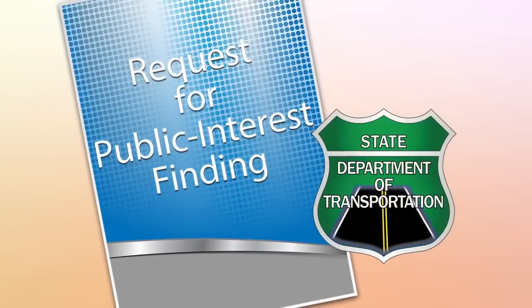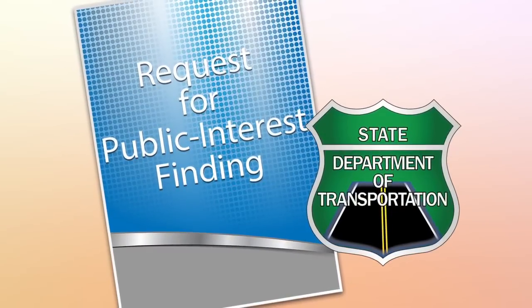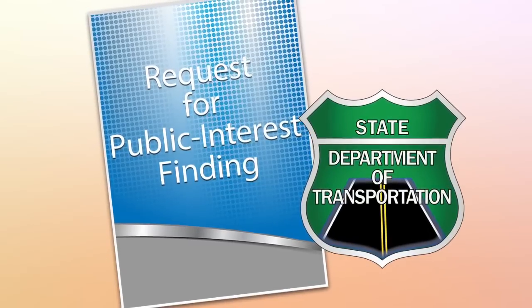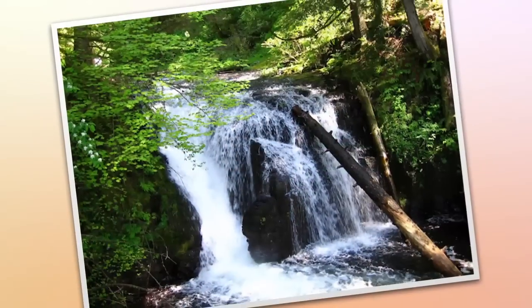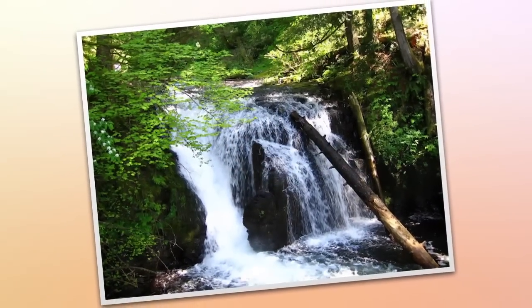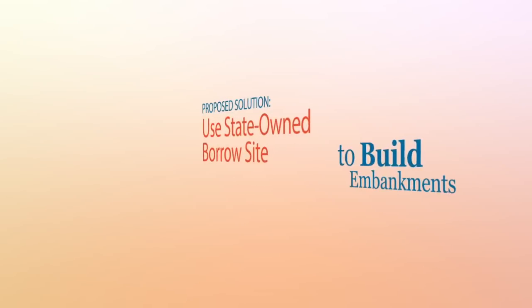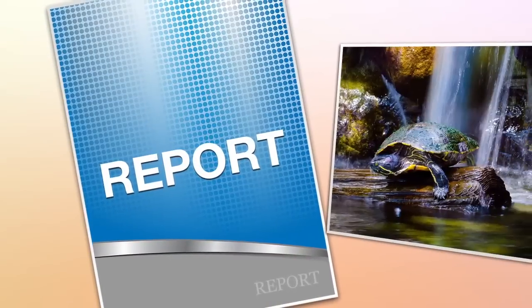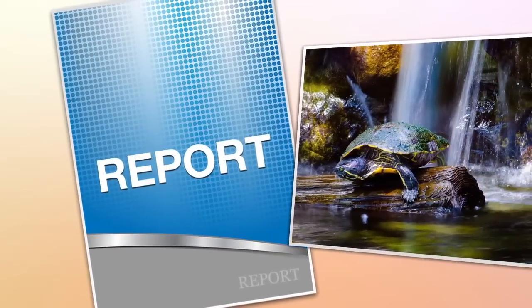To do so, the local public agency, or LPA, prepares a request for a public interest finding for consideration by the State Department of Transportation, or State DOT, as the oversight agency. As justification, the request cites the environmental commitment and the proposed solution to require the use of the State-owned borrow site to build embankments on the project. A report on the potential effects on the wildlife in the area is provided as support for the public interest finding.